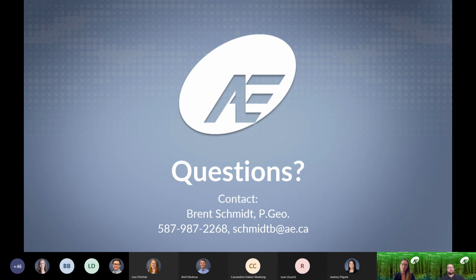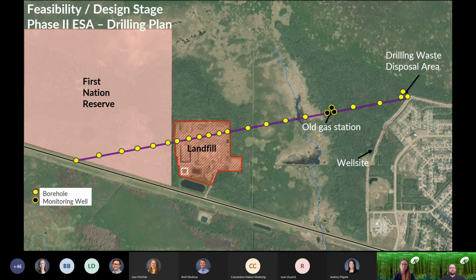Typically, if it's on private land, you shouldn't need it. But in this project in particular, we're going through a couple different jurisdictions. So just to bring it back up, the First Nation Reserve, we would be consulting with the nation and with Indigenous Services Canada to get the go-ahead and approvals there. For the provincial areas, typically we would get a TFA, or temporary field authorization, to conduct the work with the drilling. Hopefully that answers your question, Jessica.